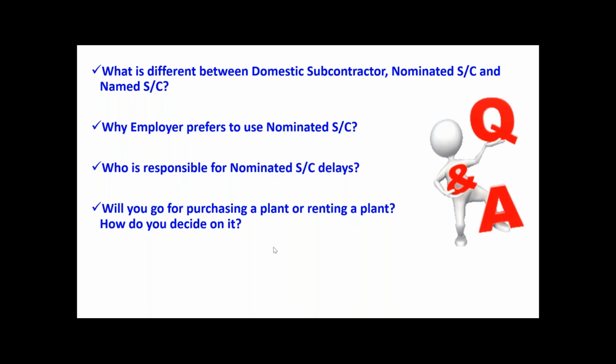Initial purchase value and the profit factor, whether it's better to go for own or rental, you have to do the calculation. Mostly if the project duration is longer, better to procure it. But again, if the contractor doesn't have that much capital, then better to go for a rental, right? So depending on so many factors we have to decide.